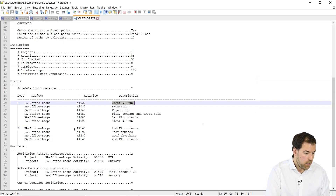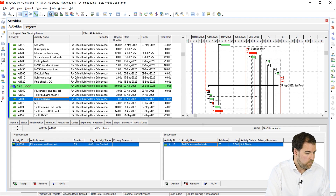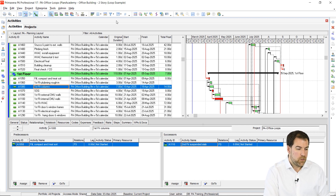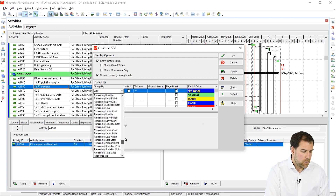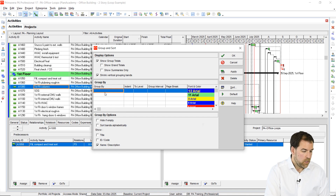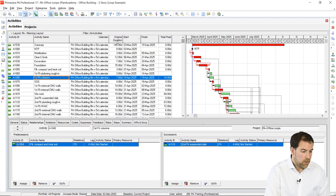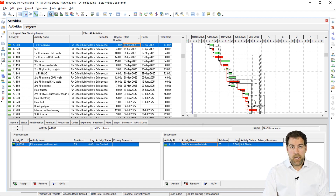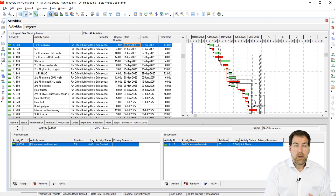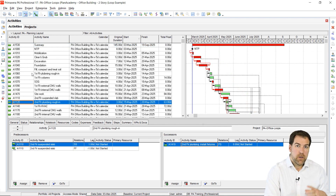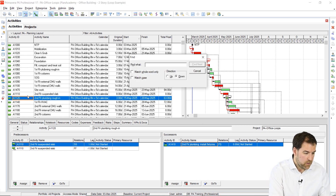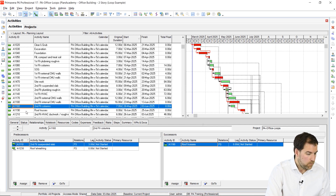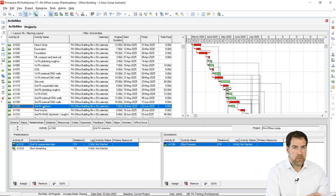Now let's find the next loop. The next loop starts with A1160, so let's go to the activity list. I'll show you another trick that's sometimes helpful for a more visual approach — turn the group and sort off. Come up here, set group and sort to none, click OK. Then if I sort the list by start date, I can see the sequence of activities really clearly in the Gantt chart, which is another visual helper to make sure I'm linking properly. Let's go to A1160. If you can't find it, do a Control+F for find and search for A1160. There it is — second floor columns. With large projects, that's a helpful tip.